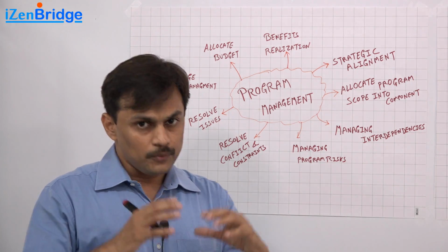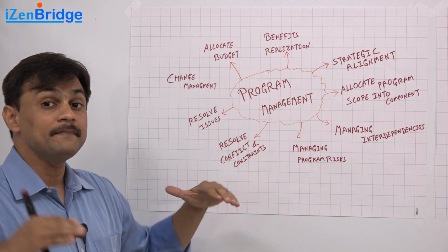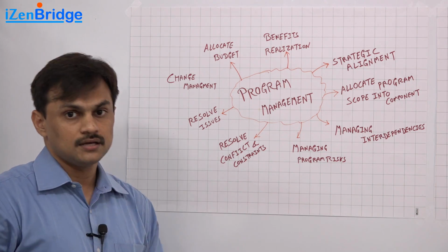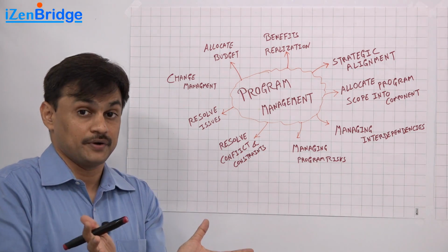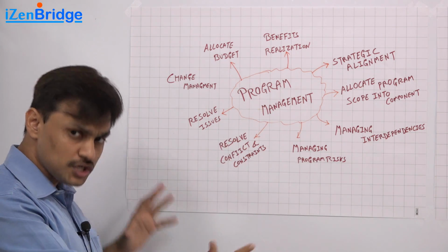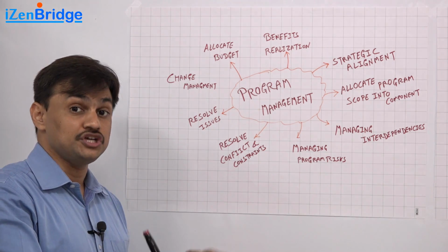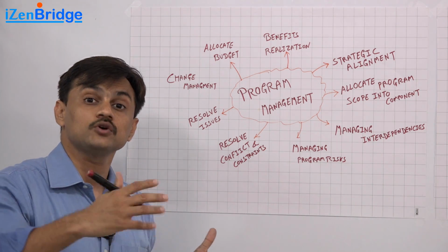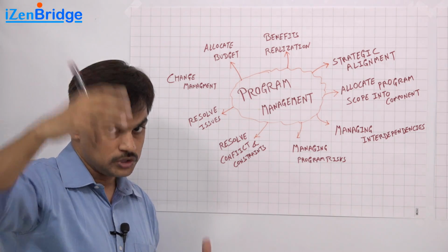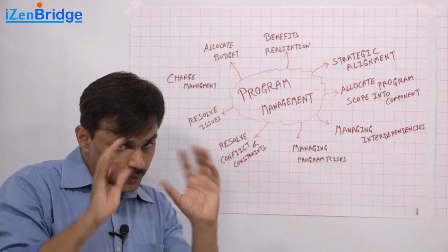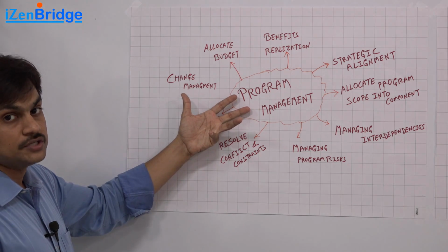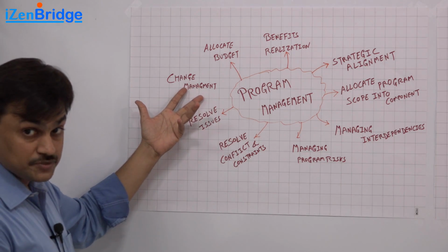Many times program management also plays a role in managing changes, managing change requests in respective projects. Since the projects, when they are part of a program, are catering to a program goal, program management should put some governance structure in place so that one project's change can be evaluated for impact on other projects and further impact on the overall program goal. So when we operate under a program purview, as a project manager, the program management stakeholders also play a role in change management.